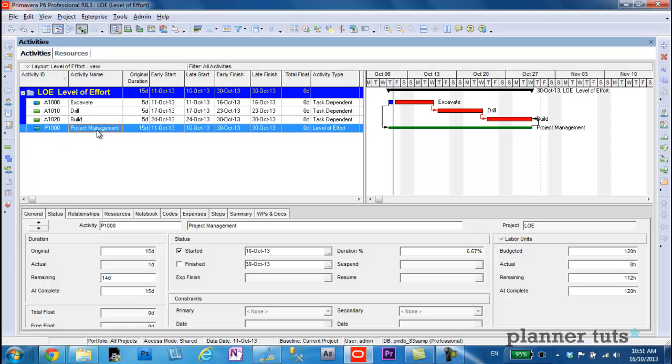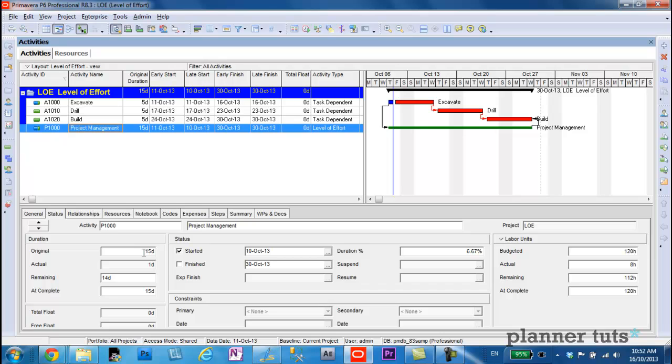So a level of effort activity picks up its actuals also from its predecessors and all the activities that it summarizes.